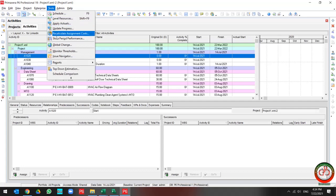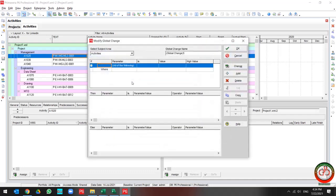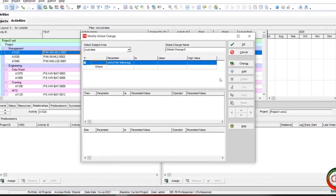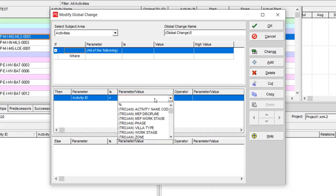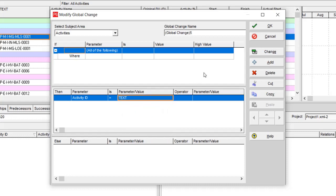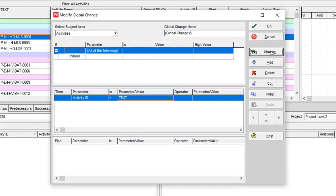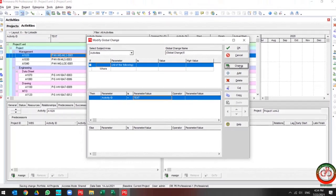I need to go to the tools, go to the global change and write new global change. In this global change, I want to update my activity ID by text field. Then I push the change and wait for the software result.